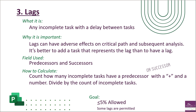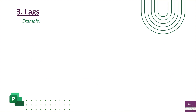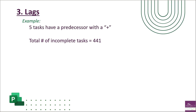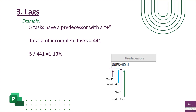The goal is to not use lags at all if you can — put in tasks that represent what that lag is instead. For example, out of 441 incomplete tasks, if five have a plus sign, that's 5 divided by 441, which equals 1.13%, falling within the five percent margin DCMA allows. In the predecessor or successor line, you'll see the task ID, the relationship type, a positive sign indicating a lag, and the length of that lag — in this case, 60 days.